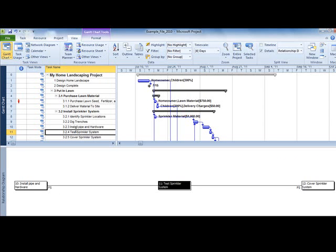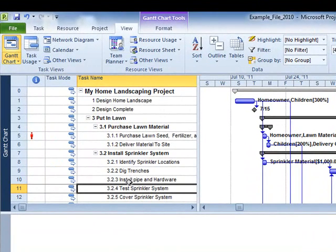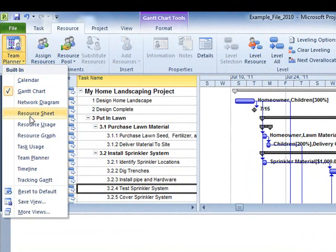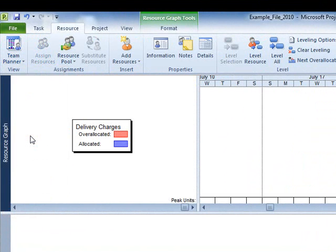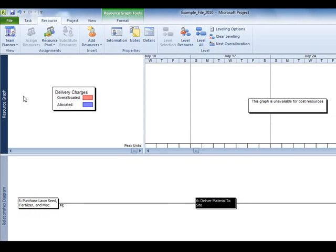Another powerful split view analysis identifies the sources of resource over-allocation. Select the Resource tab on the View drop-down menu and choose Resource Graph. Under the View tab, select the Gantt chart using the Details menu.